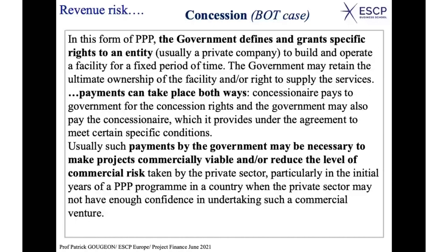So you have a kind of deal between the state and the private entity, and the idea is to make sure that the private entity can count on a safe revenue, so that you can count on safe cash flows that will be used after that as a guarantee for the lenders, which have no recourse except the cash flow generated by the project in the future.